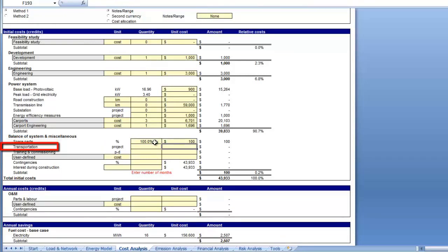Transportation costs for equipment and construction materials will vary widely depending upon the mode of transport available and the location of the project site. In many instances, the cost will depend on distance and be based on a volume weight formula. Cost to handle the material at the receiving end should be considered, and logistical control is also important. Shipping cost data suggest a range between 18 to 19 cents per peak watt for residential projects built between the years of 2010 and 2015.